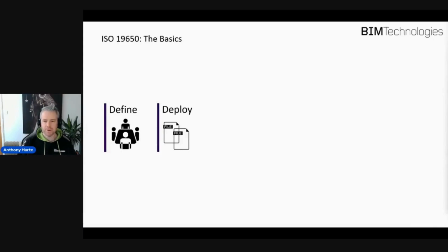So it's no point having all of the information really early in terms of planning. It might be too much, you don't need to know it all, or you don't know what that is already in terms of the content. So you wait till later on in the design stage when you've gone through procurement, and that's when you'd really get that information from a manufacturer's perspective.